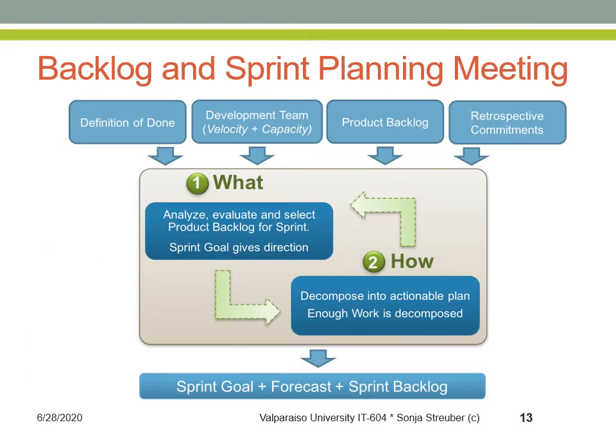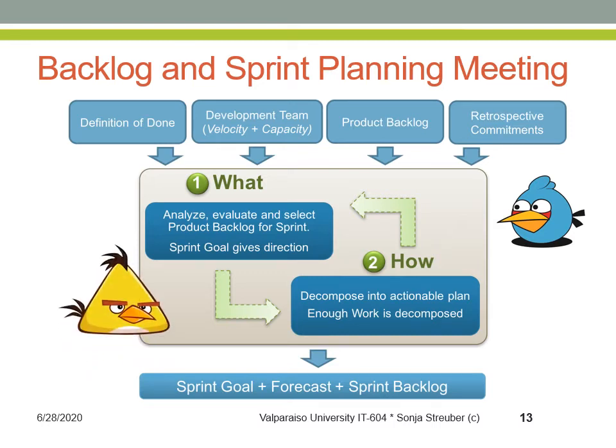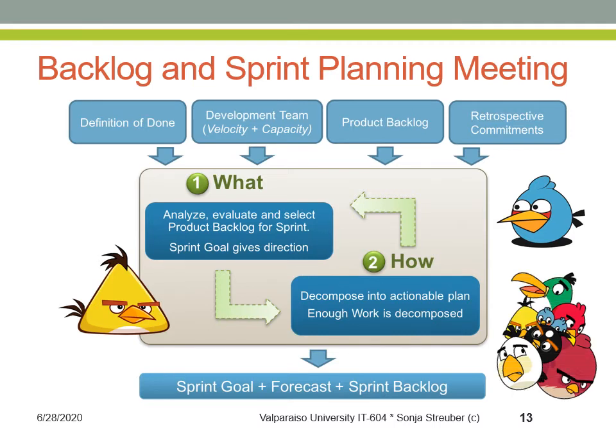Now that we know the story points, the backlog and sprint planning meeting is next on the agenda. This is a collaborative effort involving the Scrum Master, who facilitates the meeting and is in charge of all the reporting and makes sure everybody follows the process, the product owner, who clarifies the details of the product backlog items and their acceptance criteria and is in charge of all major decisions, and the Agile team, who define the work and effort necessary to meet their sprint commitment.